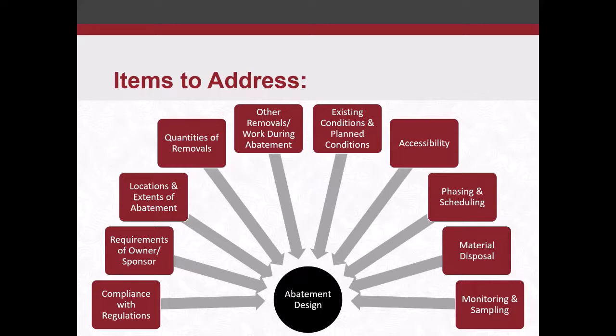So if you're going to a room and most of the things you want to remove are being done during abatement, maybe say, okay, let's just remove all the other things as well. And then the GC can come in and just start their new installations. They don't have to worry about removing more materials.